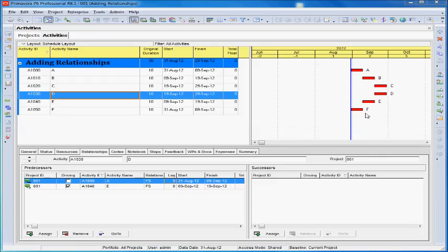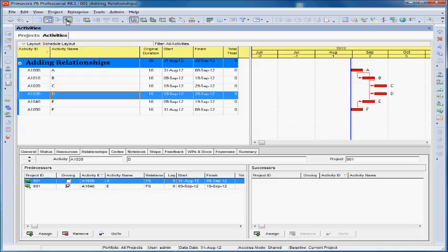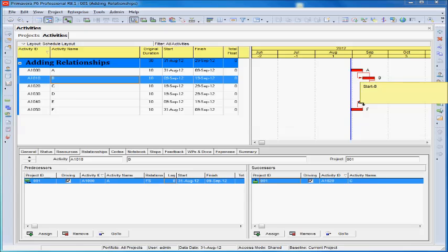The Gantt chart on the right can also be used by clicking on Show Relationship Lines. This will show the sequence of work. When the arrow is black, a new relationship can be added. For example, we can link B to E.